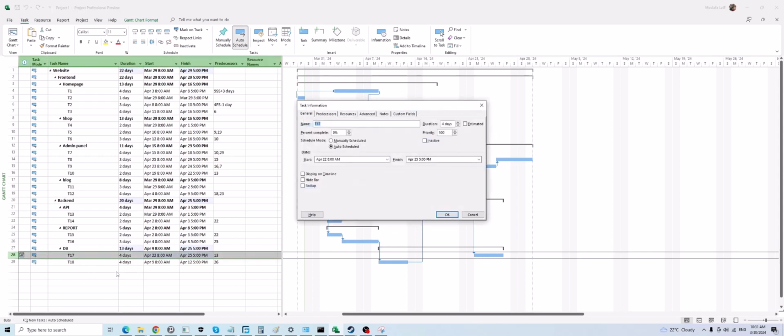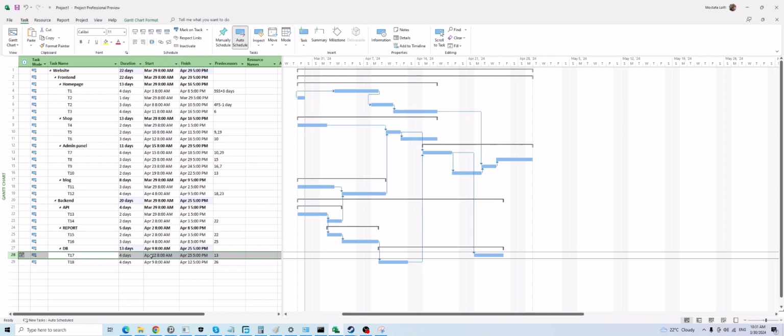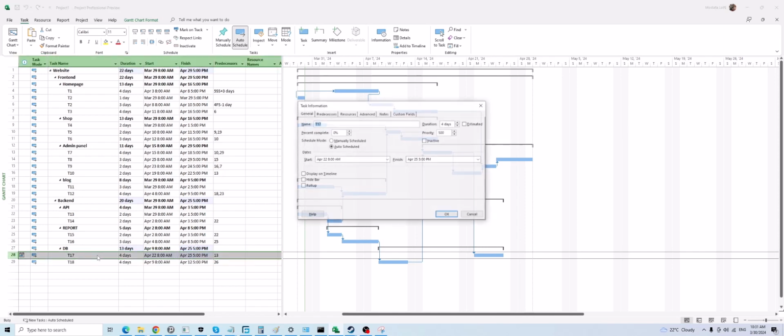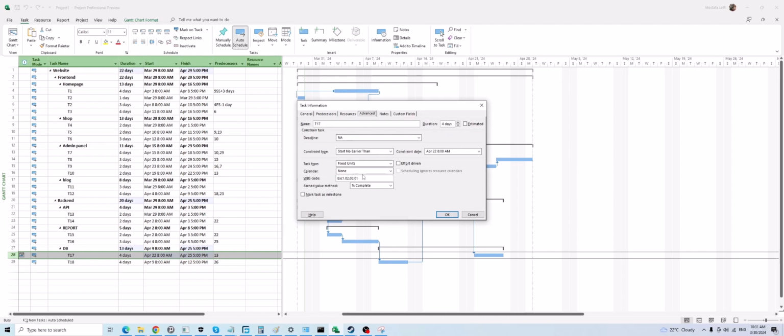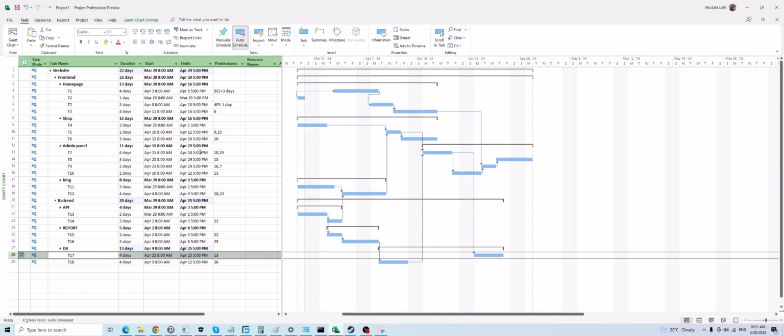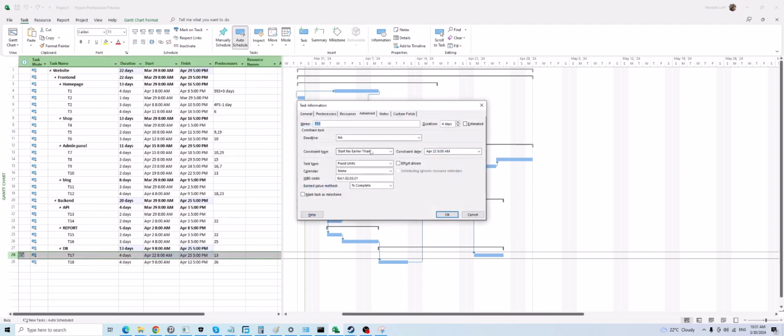As soon as you try to touch these two fields, Microsoft Project considers it a constraint and applies the constraint in your plan. That's why I'm telling you, never touch these two fields. If your intention is not defining a constraint, then it is adding a constraint on your project plan, and you may not have enough skills to identify it fast, and you will end up having a problem with your planning, replanning, and updating your plan. Okay, so